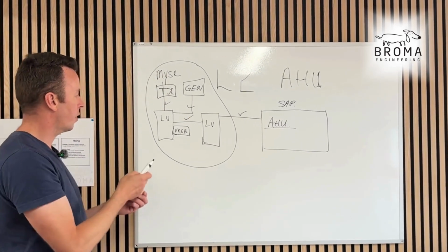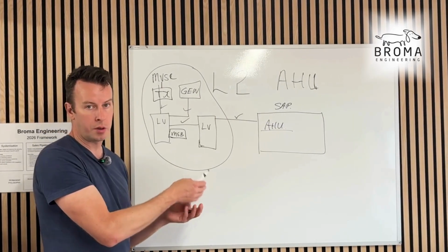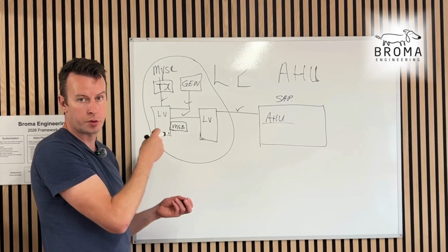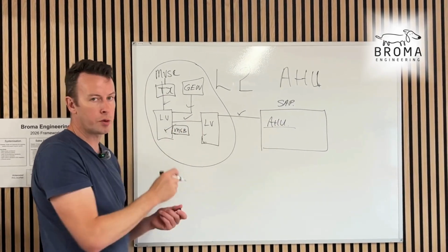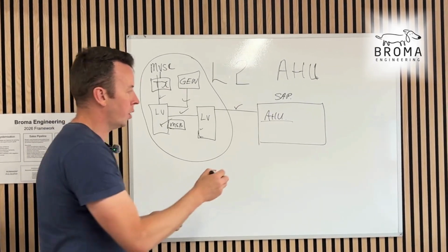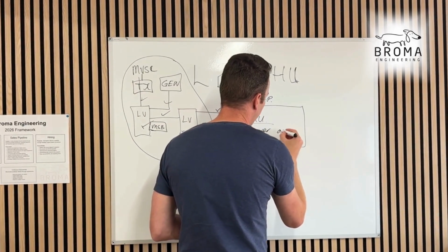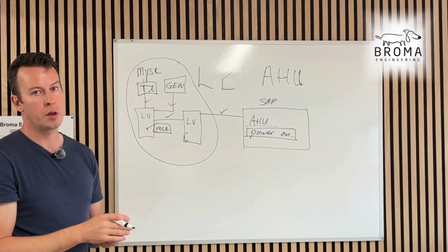So you need to be aware that your electrical colleagues, or if you're electrical and mechanical, that this sequence is properly sequenced in the schedule, and that we're pushing every day to make sure we have power available for our power on date for the AHU. We can't miss this date. Power on is what we're driving for. If we get here, we're doing well, really well.